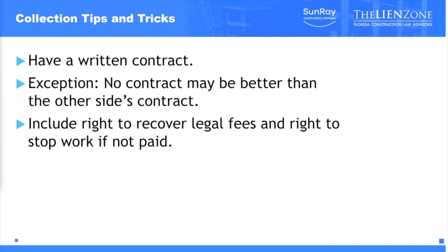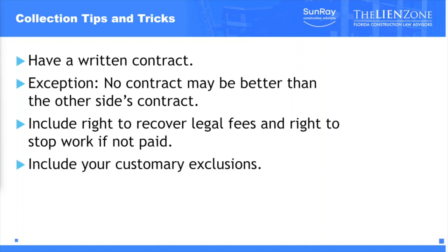Number 2, having the unequivocal right to stop work if you're not getting paid. Most contracts that someone will give you say that you have to keep working even if you're not getting paid. So you want to have the express right in the contract to stop work if you're not getting paid. It's not an automatic right in the state of Florida, so you have to put it in your contract.